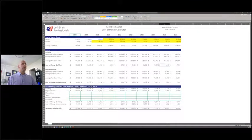And then one of the other issues is the Treasury rate. It does fluctuate. The Treasury rate doesn't necessarily go down over time, but it does go down at times. It goes up, it goes down. But unfortunately, you're taking that rate and multiplying it by a book value that is decreasing over time. In fact, the proper calculation here, and we've got the information in here for you, is over the average net book value of the year or the time period involved in the contract. So you do need to do this for the assets involved in a particular contract, and obviously the period of performance of the contract would potentially alter this.